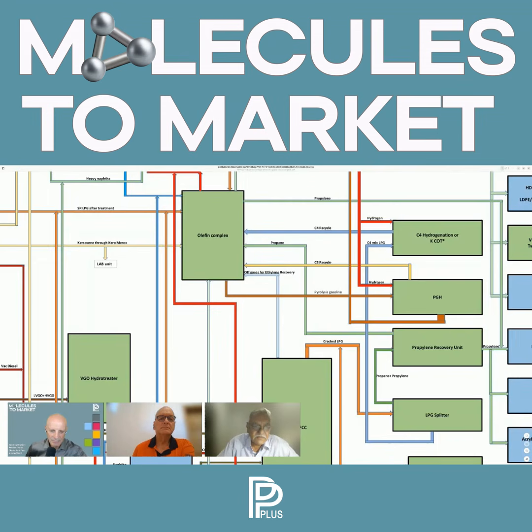Now, when we have to get a plus or minus 10% cost estimate, for each unit we do preliminary engineering. So we have some specific formats in the licensor selection process where we seek information from the licensor about the equipment data, sizes, dimensions, capacities, and some technical parameters based on the technology which he is offering. On that documentation, we do the basic engineering and convert it into an entity which can be costed.